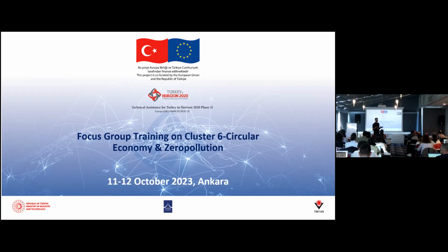So, something exactly like that. "Up and running" doesn't say anything to me. I can make something, I can put it up and it runs, but it doesn't function as I want it to function. But still, the milestone has been achieved. Why? Because it is up and running. It doesn't matter if it doesn't work as I want. It is up and running. So this is not a quality indicator, it is not a means of verification of a nice milestone.